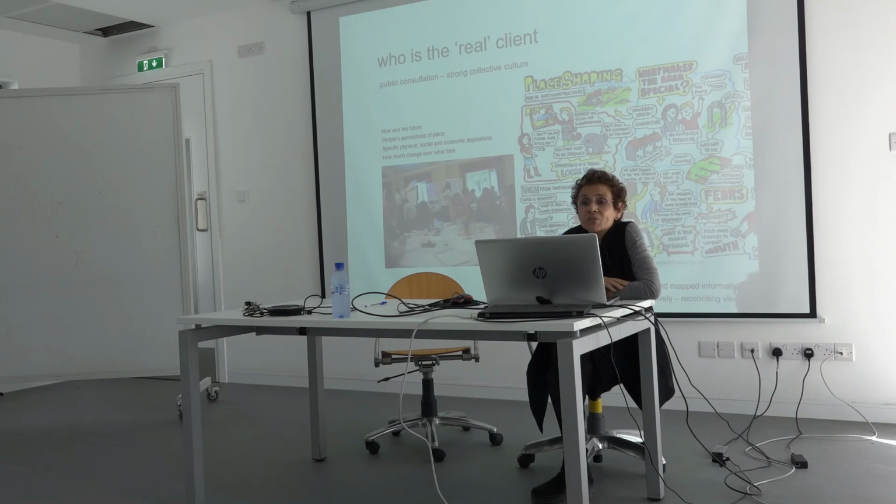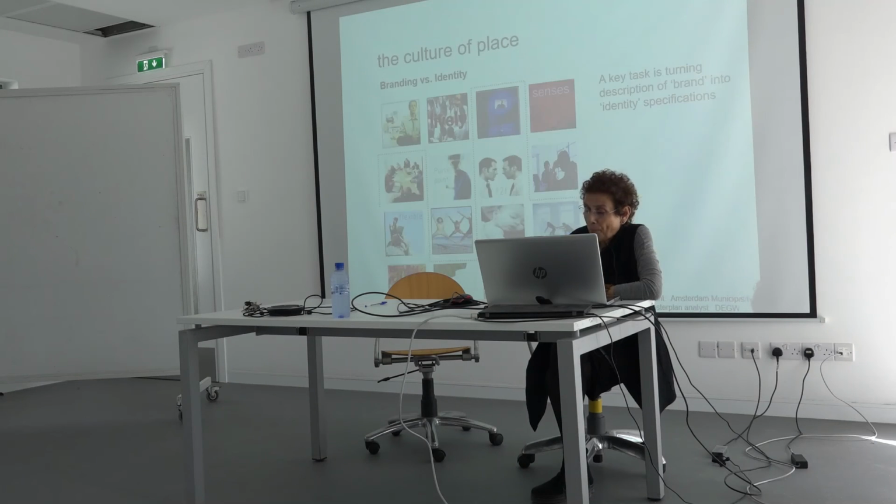Beyond the client base that you see, there is a client base that you don't see. In the UK, public consultation is compulsory. On every master plan, you need to ask the people who live around it what they think about it. So it's a huge activity identifying the public and running these consultation programs. In Cyprus, it's still very weak, and this is because we don't have a collective culture, I think. In other words, we don't have organized groups, and we don't push, and we should be doing that more.